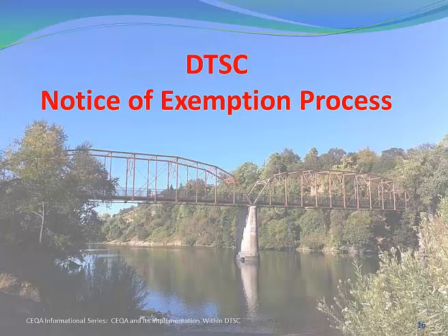Additionally, we're going to need to document in our files our analysis and why we came to the conclusions we came to. And in the long run, this will result in the permits getting out faster than they might otherwise, because hopefully we can come up with a streamlined process for doing this. But an NOE is just not going to be appropriate for a hazardous waste facility, with a few exceptions like I talked about, maybe for Class 1 modifications, but not when we're issuing a permit for another 10 years for a hazardous waste facility.